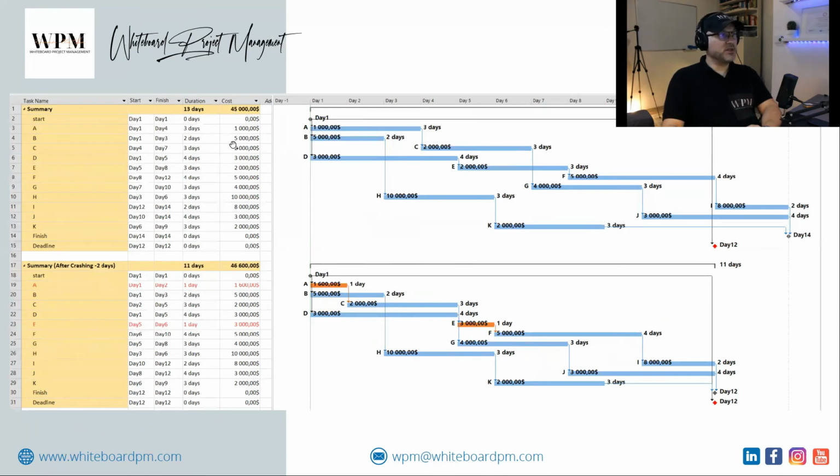The difference between the two costs, 45,000 and 46,600, is 1,600 US dollars. This is the cost of crashing for 2 days.